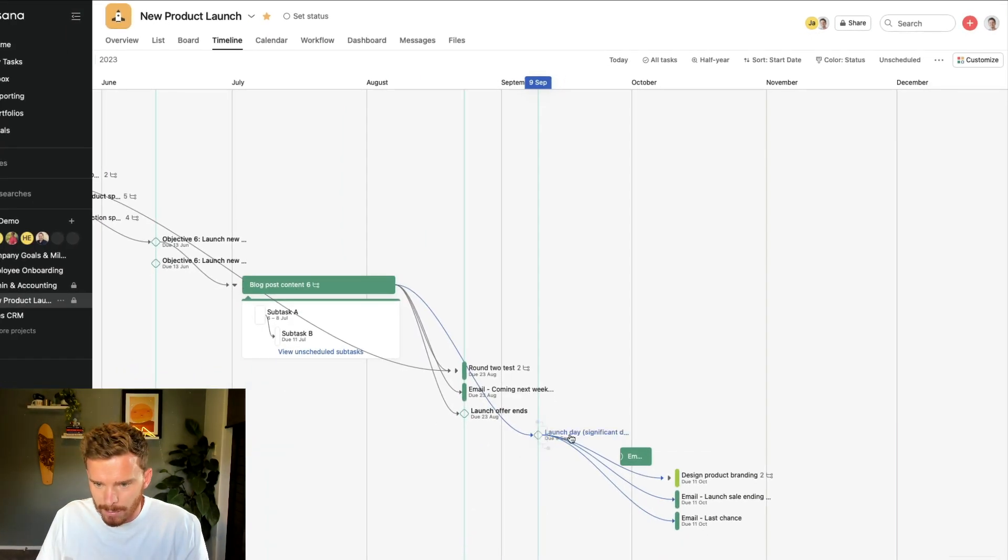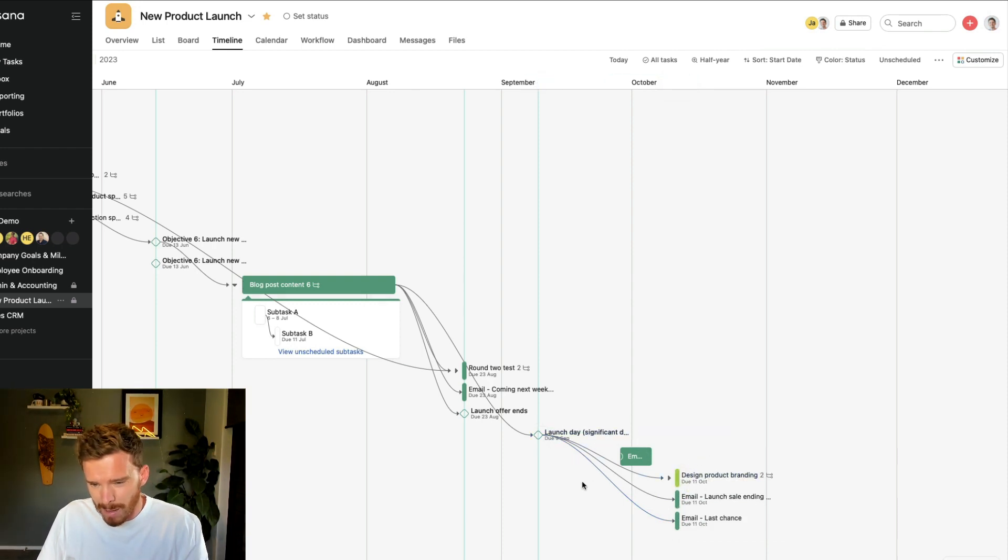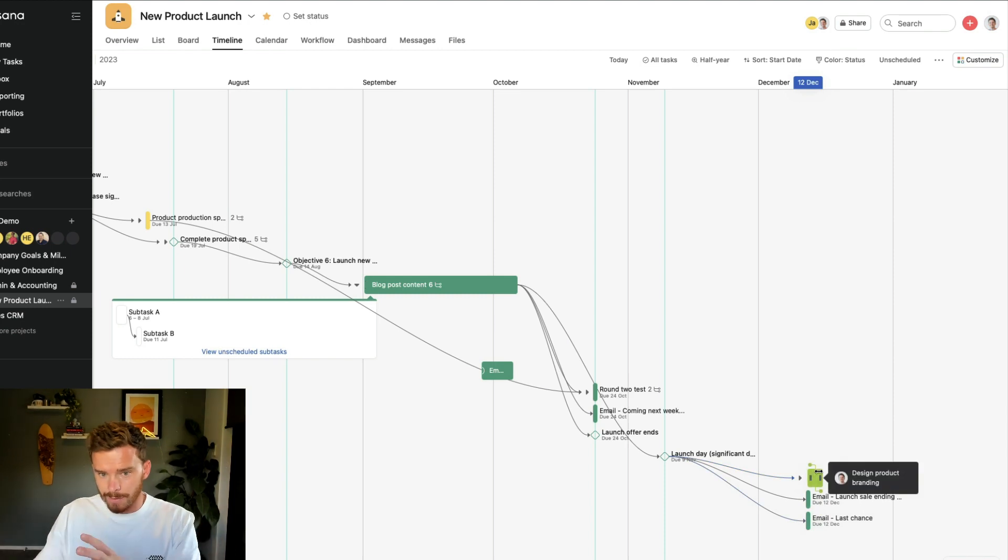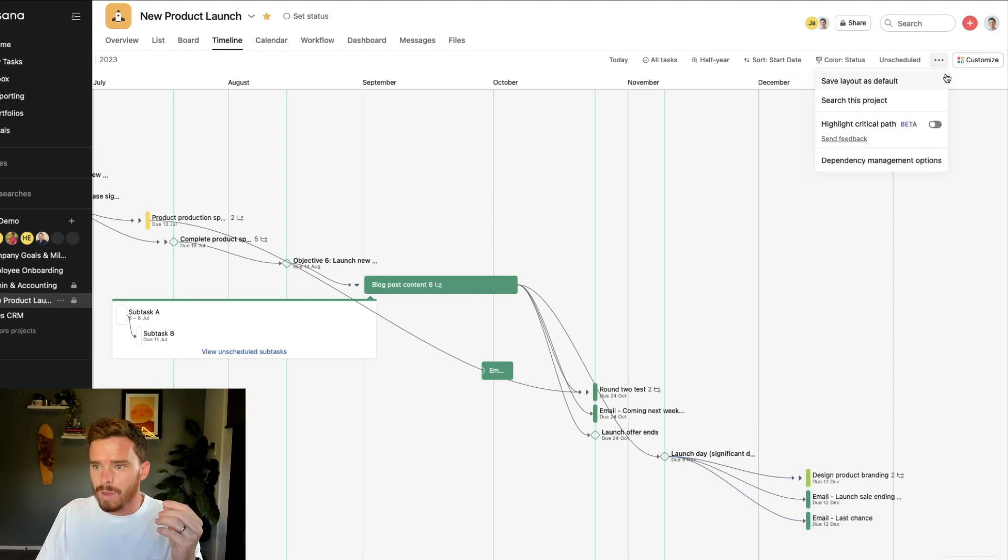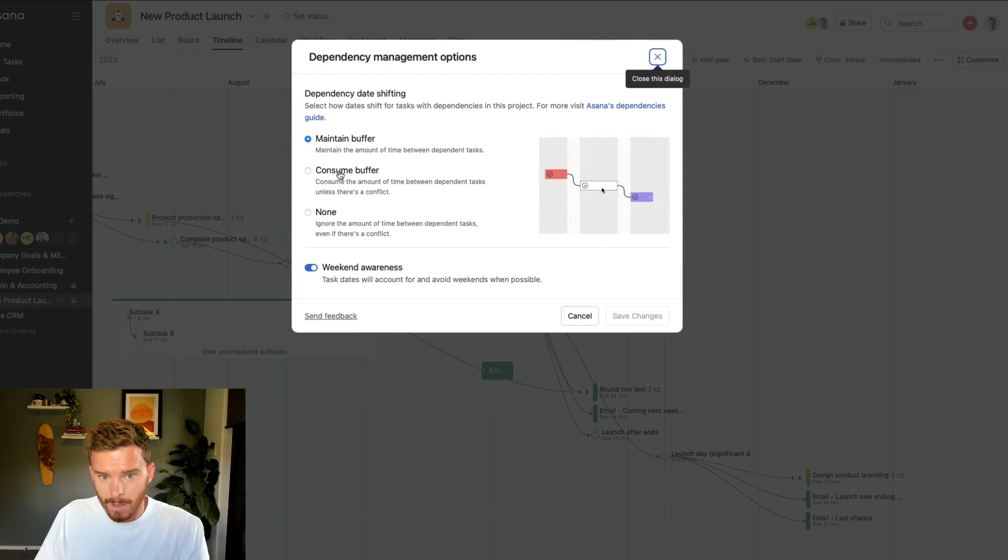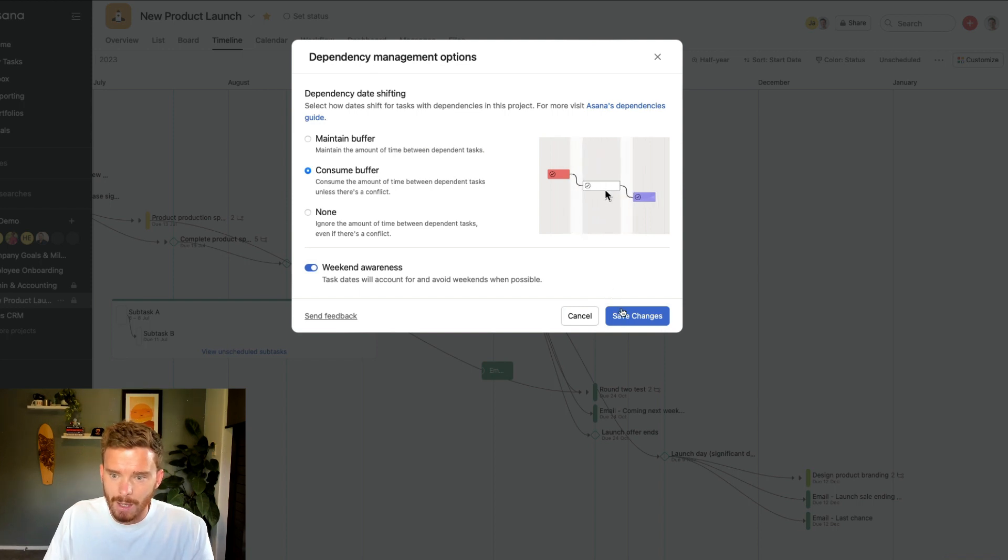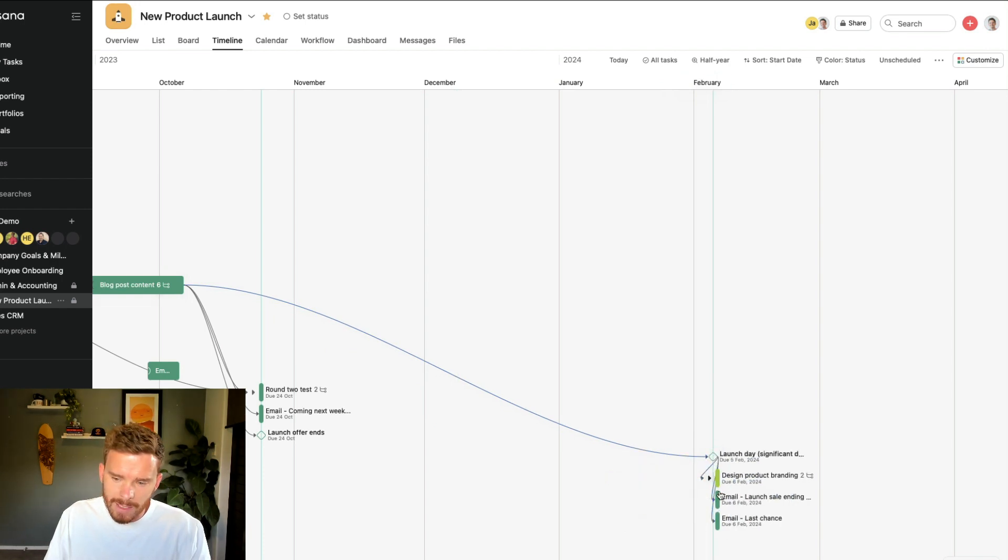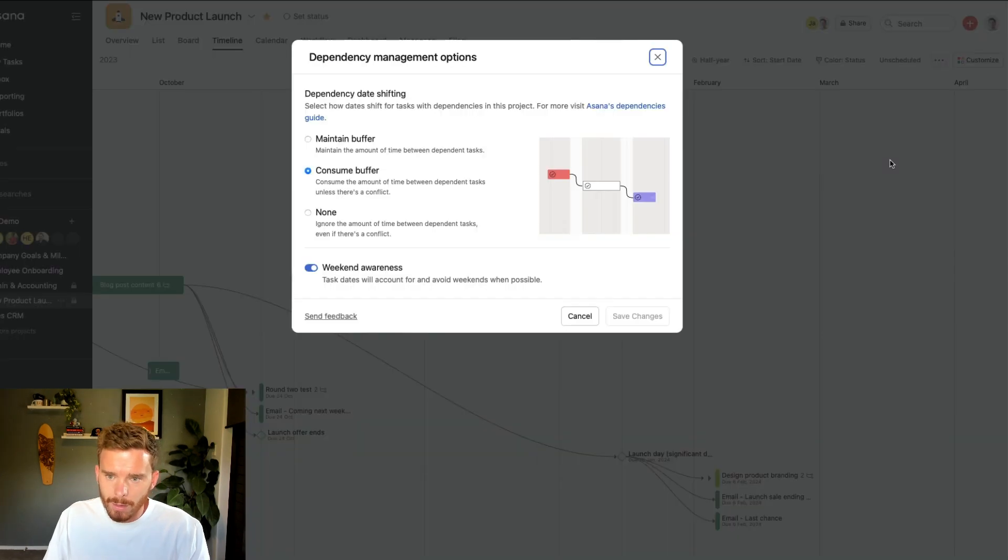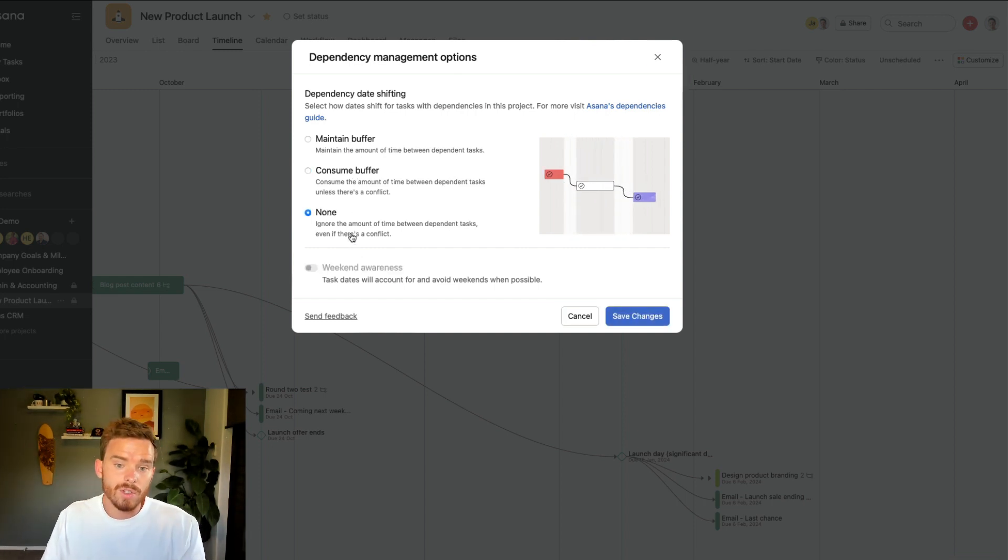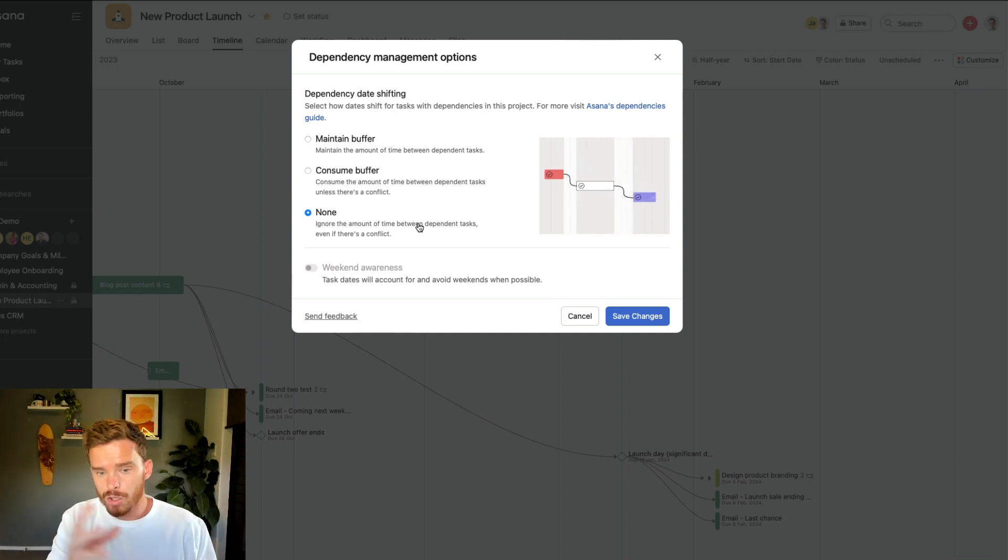What this means is let's take a task like this down here. I have this milestone and it's got three tasks downstream of it that are dependent on that milestone. And there's a period of time here, about a month between these tasks. If I shift that task back, you see the tasks downstream also shift, as do the upstream tasks. And so the buffer time between tasks is maintained. I can also choose whether to consume the buffer. If I move a task past the dependent tasks, the dependent tasks will get updated, but that buffer between them is lost. Or you can choose to ignore the amount of time between dependent tasks.